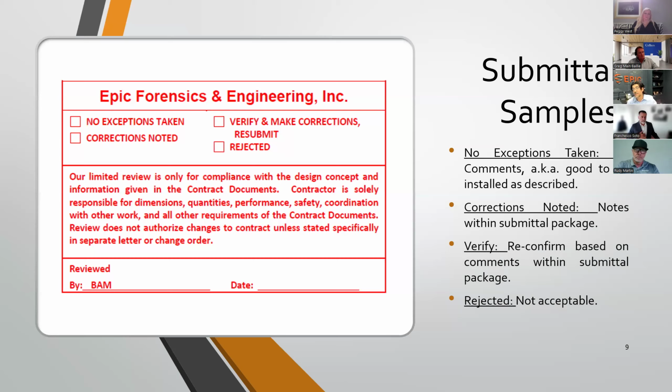Now, sometimes these submittals might occur during the course of the project. If it's something at the very tail end, like the roofing of a miscellaneous structure, which we know is going to be the last phase, that might be submitted halfway through the project for a variety of reasons. It might be supply chain issues or anything else that could come up. But how can this happen? We had a great planning phase. The smartest people on the planet. Ben probably went to school for 20 years to get all of the letters behind his name. So how can this happen?